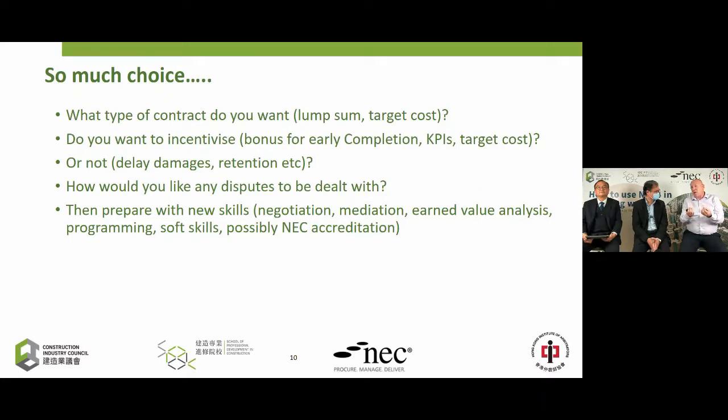If you have things like a lump sum contract, are they truly aligned? Do you have a sort of a buyer and a seller colliding into each other? One wants to pay less, one wants to be paid more. So not really aligned. But the target cost approach allows two people side by side to create that joint target, set out to work together to help the contractor beat the target and tap into the gain. So the theory is good and it works in practice.